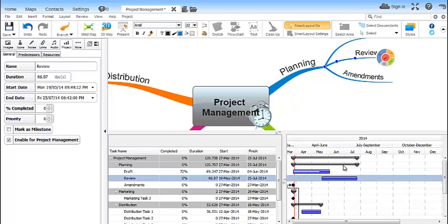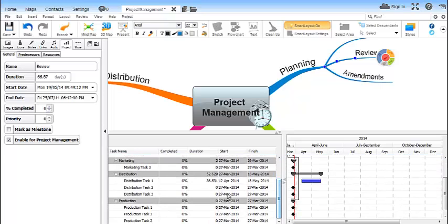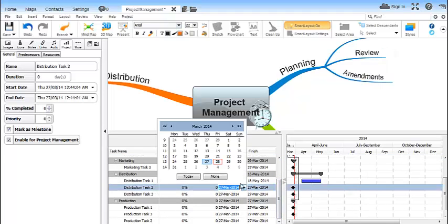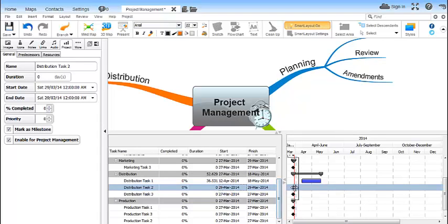tasks will be completed. When you first enter Project View, you can see that all of the dates of the tasks have been defaulted to branch creation date, probably today. You can change this either by selecting the date in the list and changing it like so, or you can change it on the Gantt chart itself. The same applies for changing the deadline of the task.